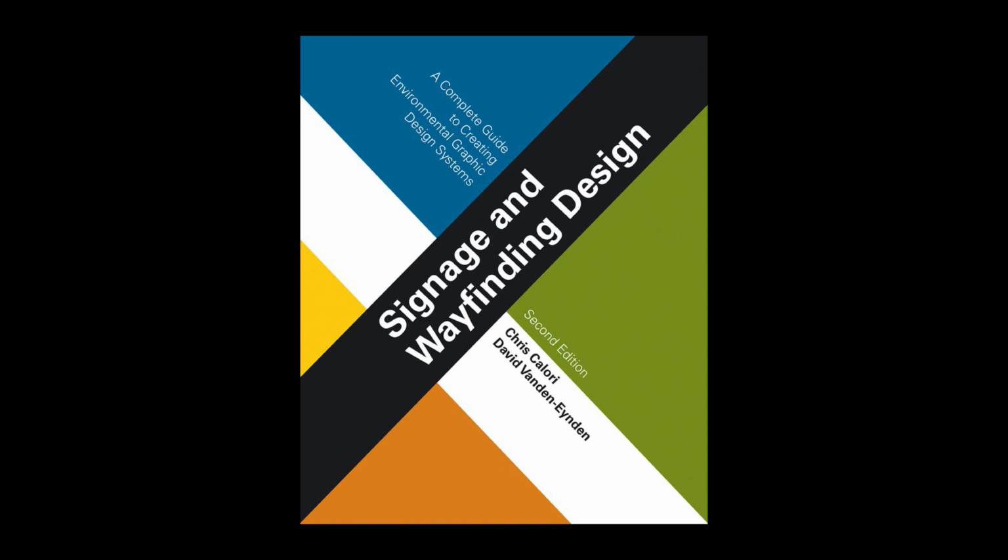Most kinds of submittals are sent to the EG designer's office for review via a routing protocol set up for the project. The one exception may be production prototypes, as the prototypes for some sign types may be far too large to transport to the designer's office. Prototypes for smaller sized sign types, however, can be reviewed in the designer's office.